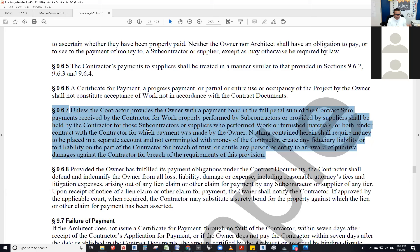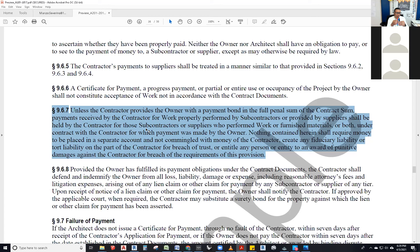Things you always need to look at when certifying a payment: schedule of values, the certificate of payment, the observation report from your latest site visit, and the construction schedule — so you know what happened, what was supposed to happen, how much he's charging, and where those numbers come from. That's the process for understanding whether to certify the full amount, reject the payment, or certify a different amount.